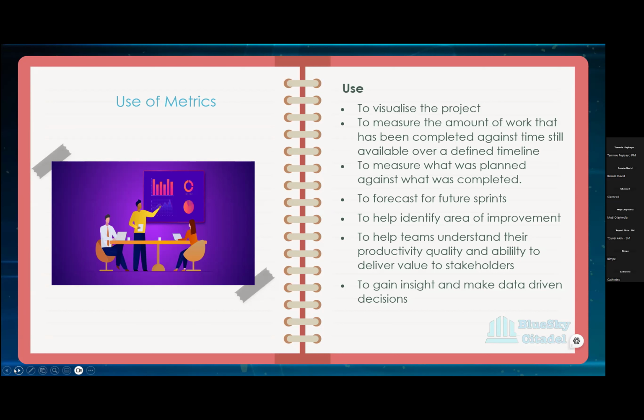You might have 2 or 3 experienced developers or engineers in your team, and then maybe less experienced team members than experienced ones. So the less experienced ones are relying more on the experienced ones, and that might be why you're having that flat. So maybe they're waiting on the experienced ones to help them review their code before they can close it. And your chart doesn't burn down until you close your story.